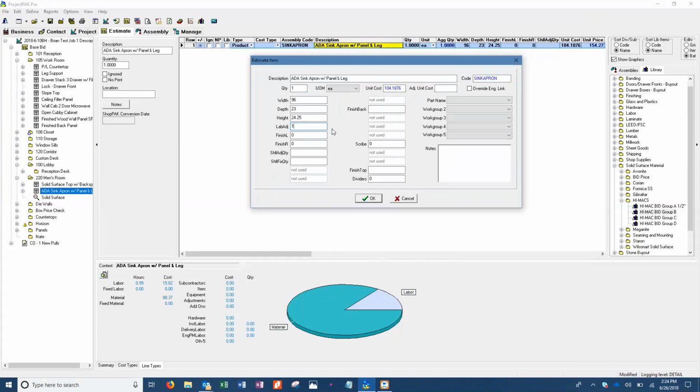It's all about the labor only. Okay, so that's adding percentages of time. Correct. We used to use it when we knew the job was all hard maple because it just took so much longer to sand it. So you'd increase that labor adjust.